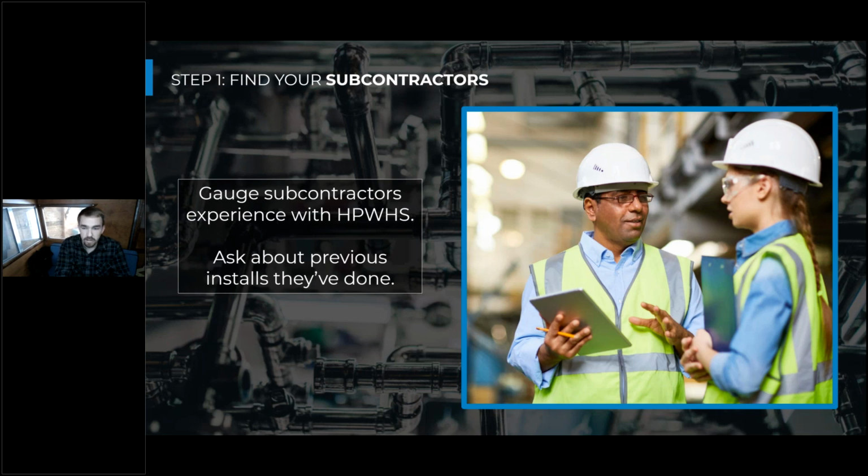The first thing everyone thinks about is the experience that a contractor might have with heat pump water heaters, in terms of gauging how successful that job could be and how they might anticipate different issues that might arise. And you'll find that there's a lot of contractors that haven't installed this equipment before because it's relatively new to this market. Everyone's installed a gas boiler as a plumbing contractor, but there's a lot fewer that have installed a heat pump water heater. So I don't think it should immediately take that contractor off the table if they haven't installed a heat pump water heater.